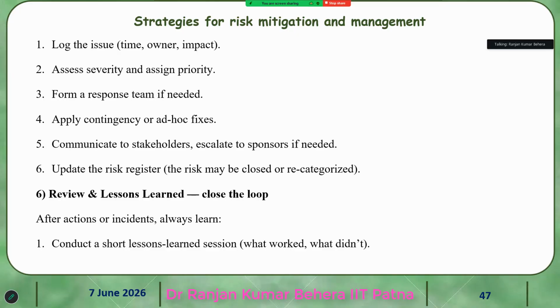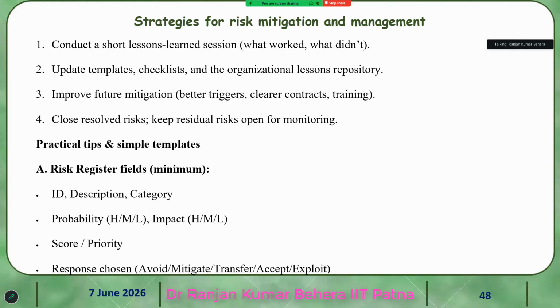After an action or incident, you conduct a short lessons learned session. So, after each session, you will understand what worked and what did not. That can be monitored or discussed. And then update templates, checklists, and the organizational lessons repository.